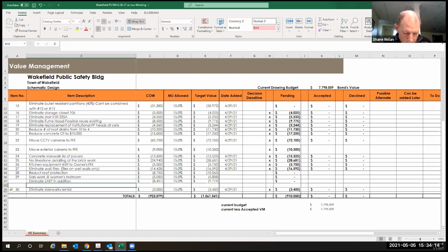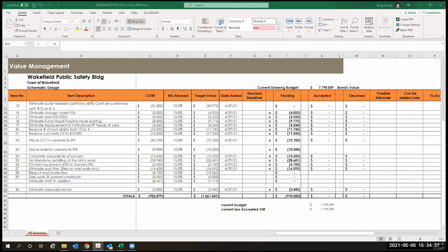I doubt it. Okay. And then just in your mechanical, you have a $30,000 line item for rigging at the end of that section, but you've included rigging under all your individual pieces of equipment. I think that might be for getting it into the garage. Is that what we talked about, that separate item, Justin? Pretty sure. Just to open up an opening and replace it to get that in, as opposed to the rigging of just getting the equipment on the roof, whatever.